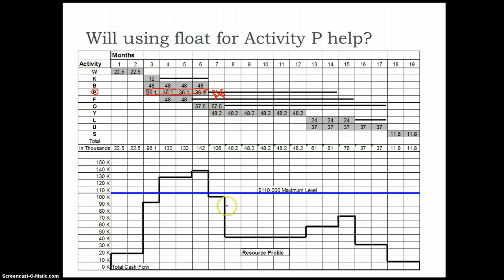But here you can see a big trough in terms of cost requirements starting in month 8. So I think it would make a lot of sense to postpone it. So if we do it like this, we could have 36, 36, 36 and 36. So what it would do is lower the cost requirements during this period, and we would be able to get rid of this cost overload zone, and perhaps it would result in a curve like this, because the cost requirements would increase. So this is one possibility.